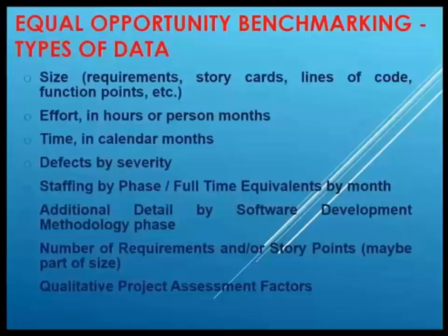When you ask someone how big was that project, usually they'll tell you an effort, and that's sort of equivalent to, if somebody asks how far it is from New York to Washington, they might tell you 4 hours, and that's a different way of answering the question. But in terms of effort, it is of course important, and again, a lot of people in my organization think of effort as the size, and it's not.